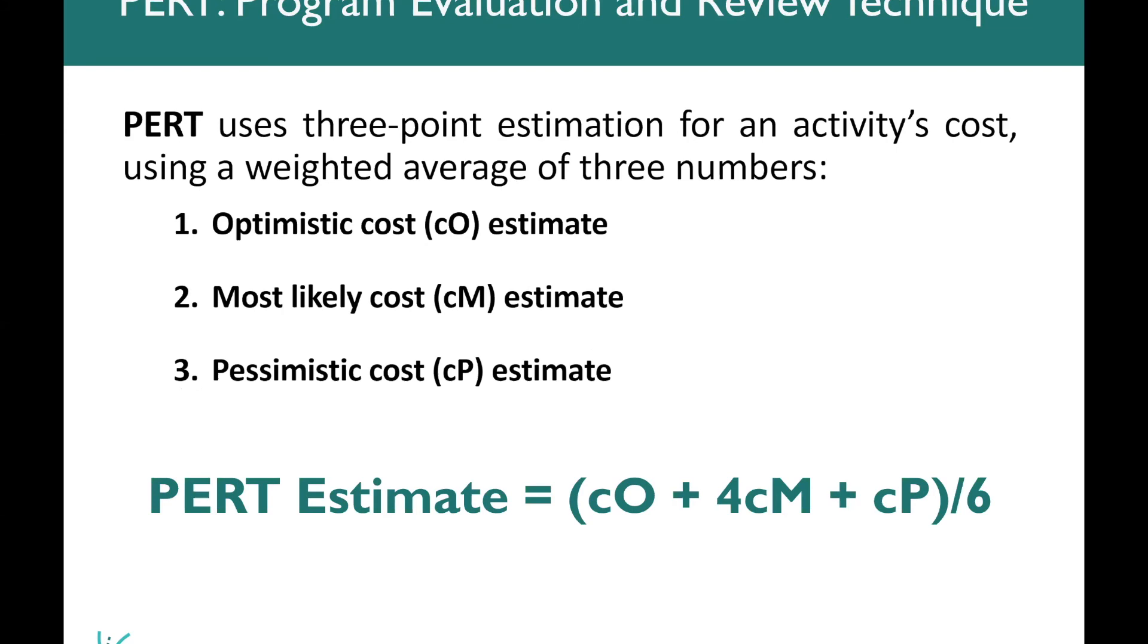You can also use PERT for cost. And it's a very similar formula here. You will see that you take your most optimistic cost and add that to your most likely cost, which is again weighted by 4. You add that to your most pessimistic cost. And then you divide that number by six. That's how you get your PERT three point estimate when you're using this on cost.